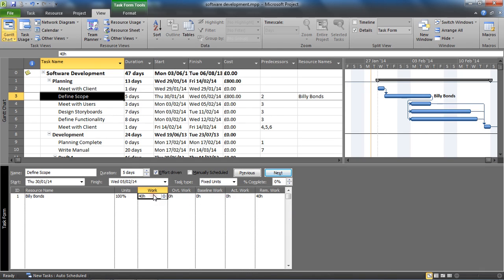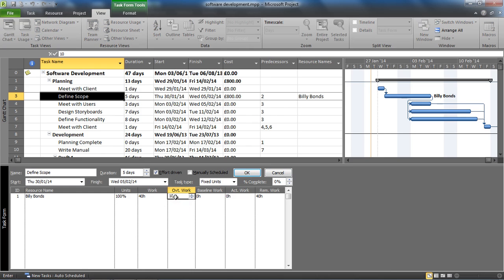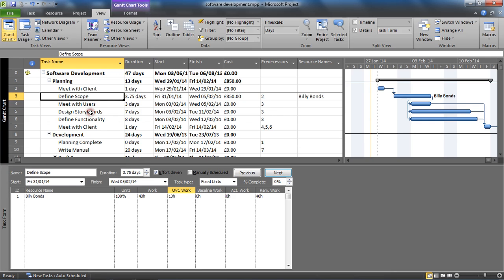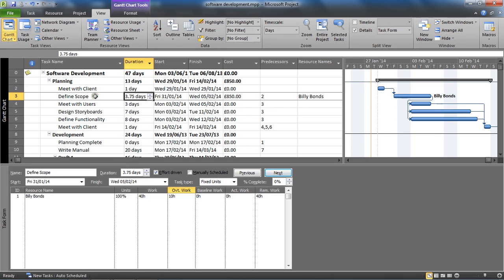We can see that Billy is doing that 40 hour week. My plan is to type 10 hours in this overtime work column supplied to the right and click somewhere in the Gantt chart to refresh that screen. When I do so, I can see the duration of Define Scope drop to 3.75.